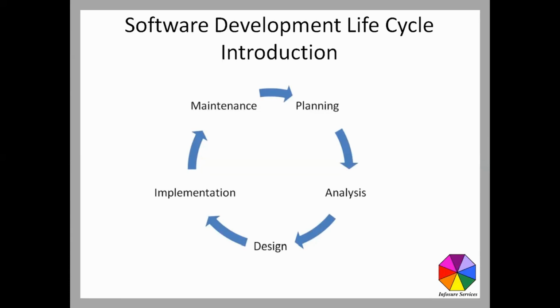Okay, so the point I'm making here is, in this implementation, the end user could also be a part of it. Now everything is ready. The client can be brought in to test and accept things. That's called user acceptance testing, UAT. Following that, only a release is made.